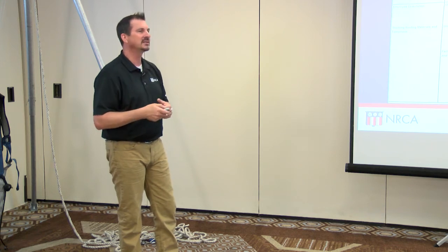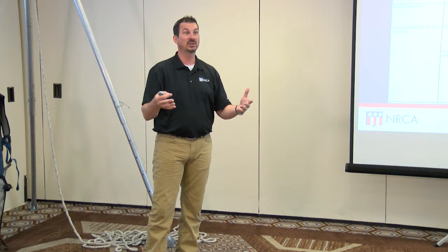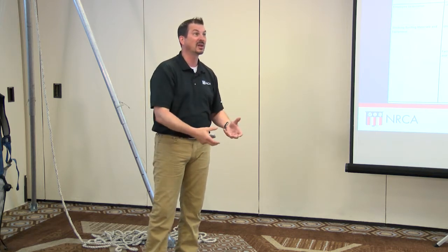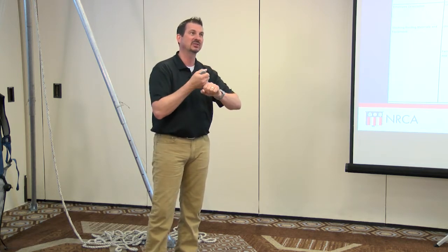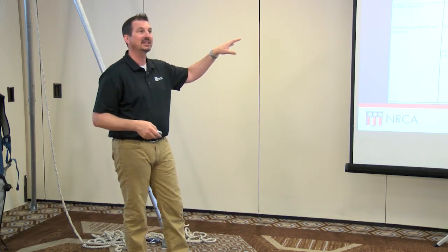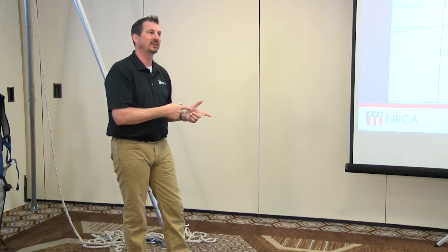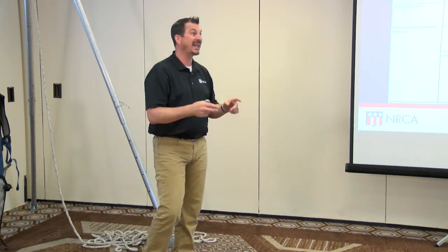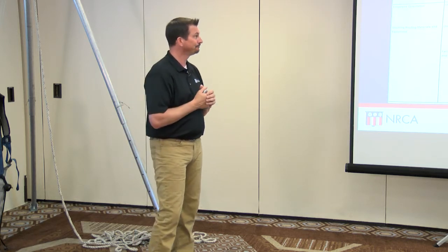But how about unsafe equipment? We get out to the job site, we start to load that job site, and we determine that we have some equipment that has broken parts, or something's not there, a cap, a wire is disconnected, or there's some damage from when we were hoisting it. In that situation, what we have to do is actually take that piece of equipment and look at it as if I don't want this to get onto the rooftop. Because one of the things we have to do is make sure that all of our equipment and any recognizable hazard that we have there is taken out of the scenario, right?